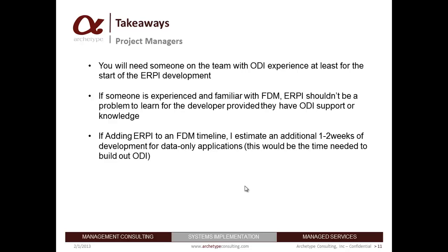And Ruth asks, if you were just doing ERPI, how long would that take? I would say it would depend on the amount of mapping, the amount of data movement, if the client wants to bring in those dimensions from the GL. If you're just doing data only, something very simple mapping, data only, I would say you could probably do it in 4 weeks, 3 weeks maybe, if you have someone who knows what they're doing.